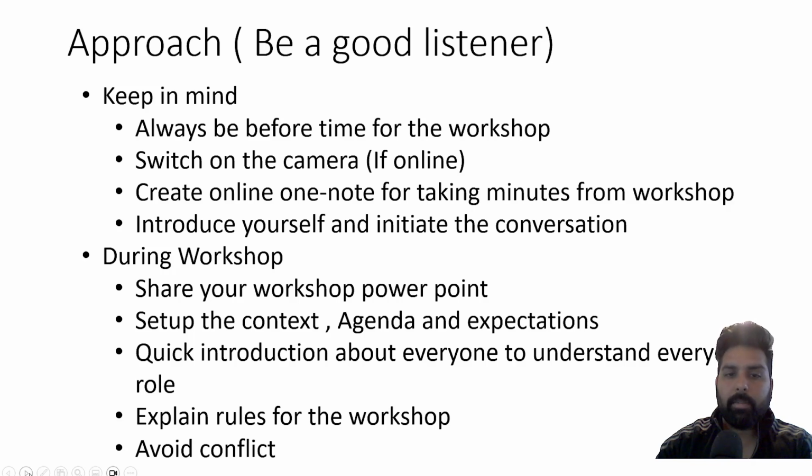And also avoid conflict during the workshop with the key stakeholders. It is very normal that when you talk to them, a lot of conflicts will arise during the requirement gathering. So avoid those. If the user is explaining something which you do not agree with, or you have a conflict about the product plan or the program you are delivering, document it and provide that information to the person who is representing the customer, and that person's responsibility is to resolve those conflicts with the user, right? So do not get into an argument or conflict during the workshop process.